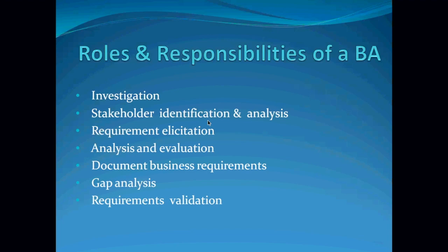Once they have the sign off, then that is baseline. So even if you send it to the technical staff or the supplier, and they develop and deploy the project, and the stakeholder comes back and says, no, that's not what we requested, then you can say, I validated this with you, this is what you said, and this is what you signed off. But if you are not carrying out the validation process, that may cause problems for the BA, with the stakeholder asking, did you validate the requirements I told you?